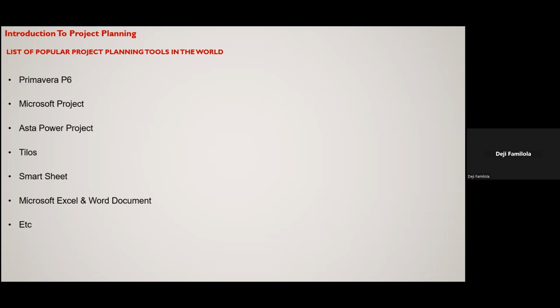They will ask you to submit your detailed plan, probably per period, and that period could be 1 week to 2 weeks to whatever, maybe 2 months. So it depends on how complex the project is. From my experience, my reporting cycle or update cycle ranges from 1 week to the maximum I've had, which is 1 month.